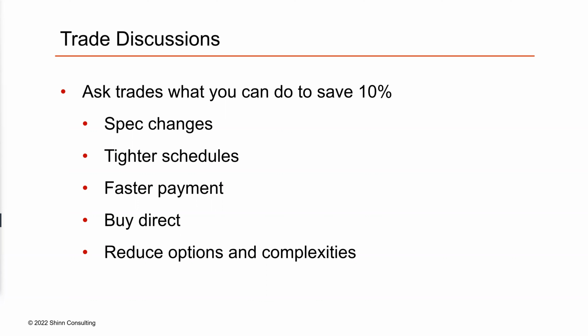By the way, in direct buying, Dave and I will talk about drywall all the time. If I'm buying direct on drywall, how hard is it to buy direct? And what's my savings on the material? Depending on who you talk to, it could be anywhere from 10, 15, 20% or more on material. Not to mention, depending on how you're buying or who you're buying from, you might have a better credit rating than your trade, by the way. So I might actually get a couple points off just on that. So at this point, all things are open to talk about.